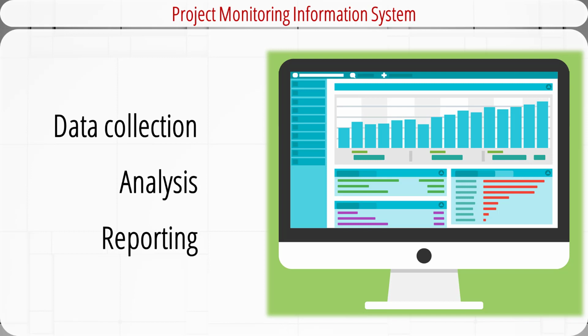The data that need to be collected include the current status of the project in terms of the schedule and cost, and remaining cost to complete the project, the date that the project will be complete, and the cost or schedule overruns and the reasons for them. The data collection task also needs to identify who will collect project data, how and when data will be collected, and who will analyze the data.